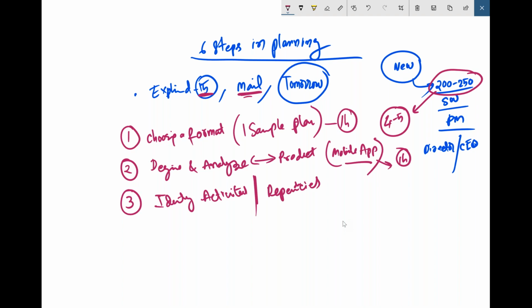That means, in order to develop a mobile app, what are the things you require, whether you want to develop a native app or a hybrid app. These are the fundamental things you typically require, and what is dependent on what. Maybe something needs to be completed in order to get another task done. So you will say, these are the activities. Typically there might be 5 or 6 activities, something like 3, 4, 5, and maybe 6. You can do these two things in parallel, and then you have to do these things in sequence. So this is understanding activities and dependencies. If you need to achieve 3, you need to achieve maybe 1 and 2, right? These are the activities and dependencies which you are going to achieve.